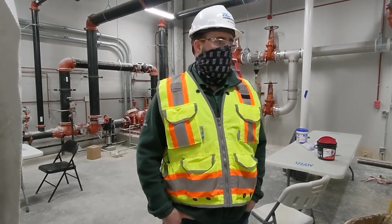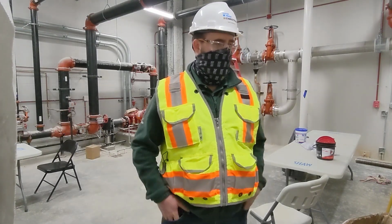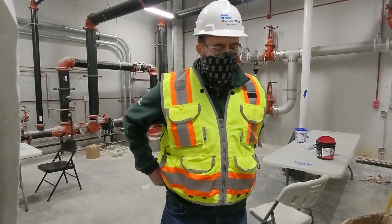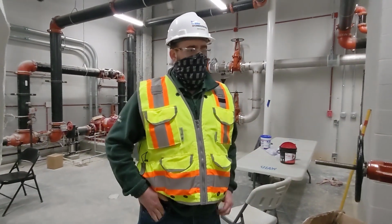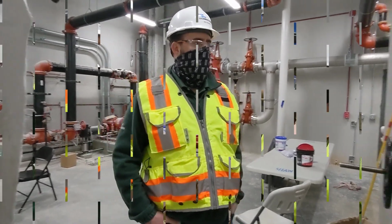We honestly did not have a whole lot of delays, if any. We did have a brief delay with the air handlers, but that was primarily due to shutdowns with COVID, so I think everyone can forgive that. But every piece of equipment showed up in time to support the schedule and move forward.